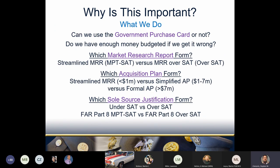The IGCE value impacts us on the customer side in several ways. First, it determines if we can meet the requirement on our own using the government purchase card — if the dollar value is above the micro-purchase threshold, we can't and have to go to contracting. Second, if our IGCE is under the vendor quotes we get, that might mean we went over budget. Can we still afford what we need? If not, we'll either have to ask our bosses for extra money or do without. Third, if we have to send a requirements package to contracting, the IGCE value determines how we document the requirement.